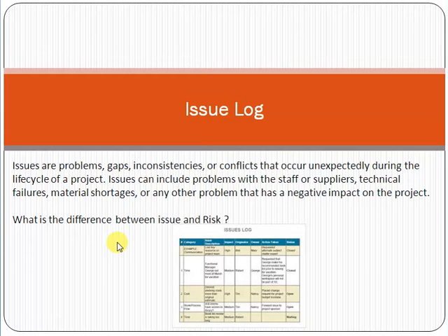So friend, all these issues you can just open a Microsoft Excel sheet and write them all down, and see what the possible solutions are. Assign these issues to someone, any resource who will be responsible for resolving them, and you can assign some target dates as well by which these issues will be resolved.